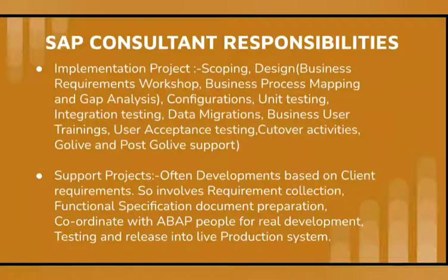And the next one is go live and post go live support. So go live is generally one day. The business and the SAP consultants, the steering committee, will decide the go live date, and on this date the first transaction will be executed by the business users on the production system. Once all the transport requests are moved into the production system, this first transaction will be executed by the business users, and the real business process will be executed. So that is called go live.